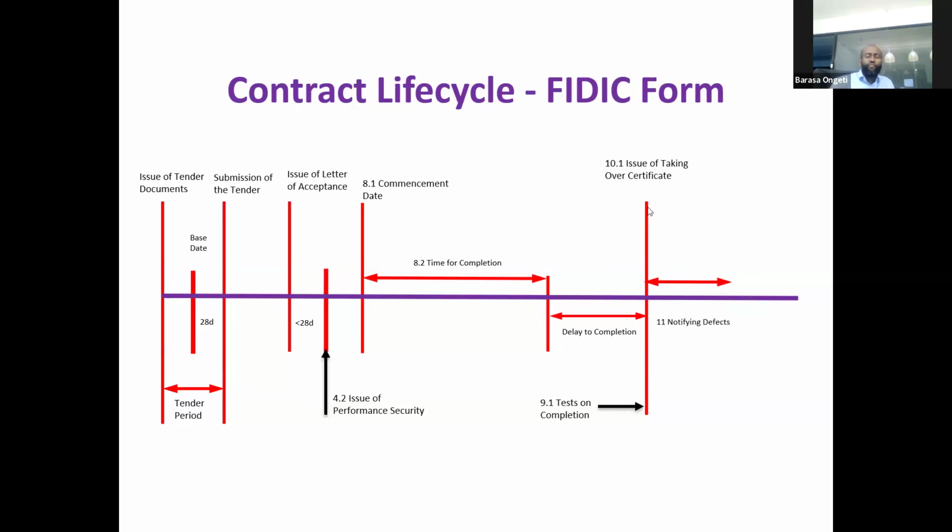You have a period for notifying defects, and it's governed by clause 11. This period is called the defects notification period. And if any defect arises, this was the question raised by, who was it? This was a question raised by Isaiah. Isaiah said that the defects are occurring here. They're not occurring here, which is a very distinct issue, but we'll sufficiently answer it in due course.